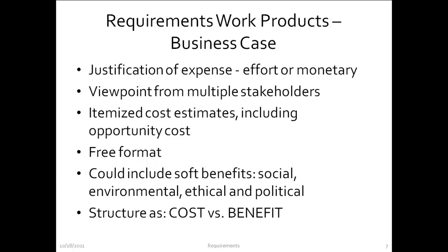The next work product is a work product known as a business case. This business case is a justification of the expense of doing the project. So note that again. It's a justification for the expense, in terms of money, effort, people time, and so on, that will go into the project. And it should be structured in two parts, a cost section and a benefit section. In the cost section, you have ballpark estimates of how much money will be spent, how many hours will be expended, and so on. And in the benefit section, you have the value that will be generated by this system.